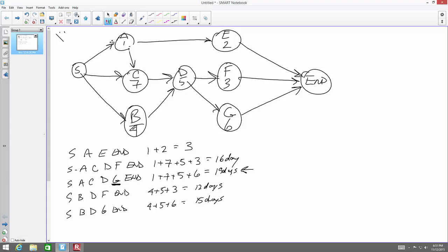If a contract has a value engineering clause in it, and a contractor suggests to the owner that a feature or method be used to reduce the annual maintenance cost of the finished product, what will be the most likely outcome? A contractor will be able to share in a one-time owner's expected savings cost.